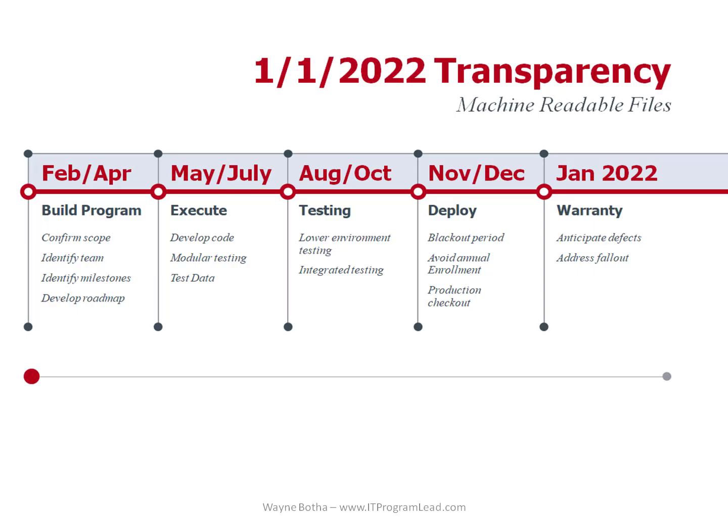My approach is to look at the big picture, document what is already known and likely to occur, and then expand on the details as more information becomes available during the program. I laid this big picture plan out from the end game, working backwards from the 01-01-2022 deadline. Let's talk high level about the plan.